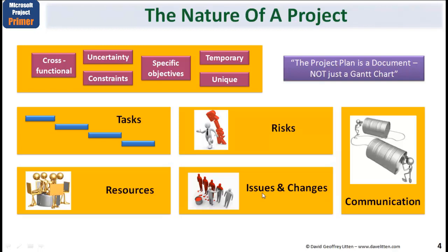An issue might just be a standard problem or a concern, but it still needs to be managed. So guess what? It means you'll end up having tasks with resources on them to help manage such issues and changes. And probably the most important aspect of project management is that of communication. Remember that communication is what information is important, who needs to get and to give that information, when it should be given or obtained, who needs to give it or receive it, and the form or manner or channel, if you will, of how that communication needs to occur.